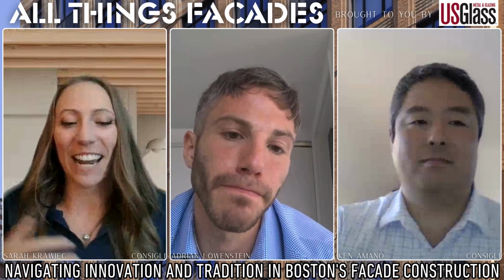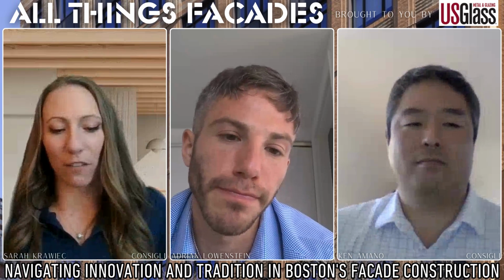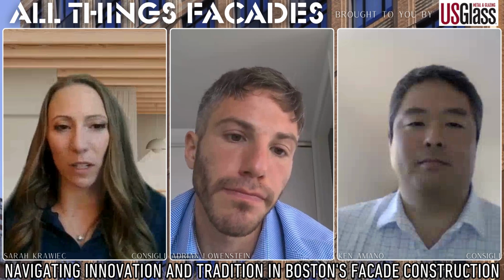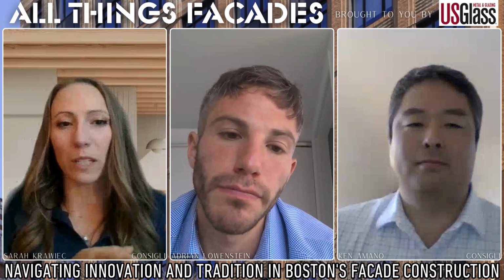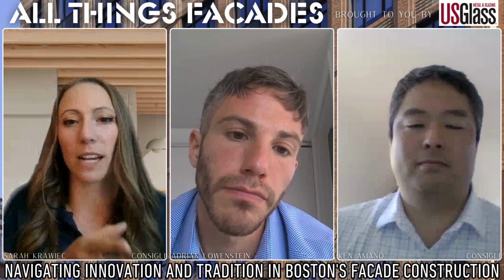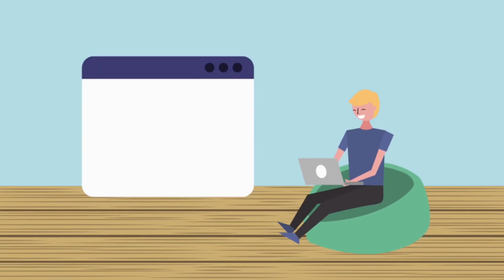And so to get ahead of that learning curve, I really think it has a strong emphasis on the workflow and checks and balances or checkpoints. For example, I'm going to keep mentioning mock-ups because it's just mock-up mania of, okay, now here's our trial and error. Going back to mass timber, we did mock-ups of all the different scratches, dents, any of the typical damages we might see. That way we can get ahead of that, knowing it's going to happen. So there is going to be a learning curve, but how can we